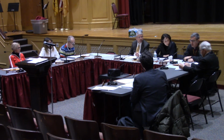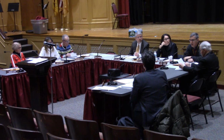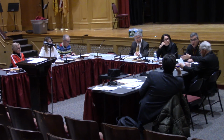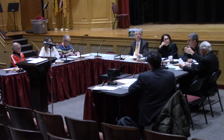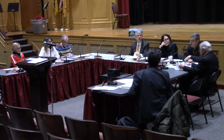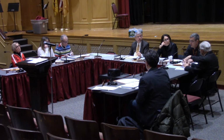I just, personally, think there's going to be some scope creep because of the hallway. The hallway is going to need to be remodeled too, which will require new lighting. It will require integration with the HVAC in order to get proper airflow. While this is a basement, it's really a basement on one side. On the other side, it's daylight. It's all open, but the hallway is isolated. The classrooms and the faculty rooms are not. So that hallway really needs to be integrated so that it has better airflow.